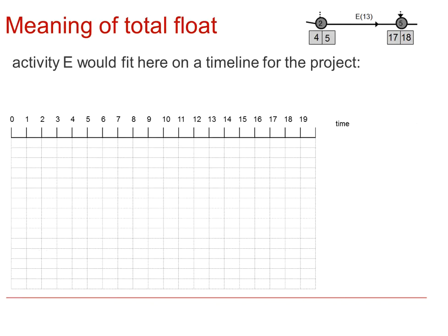So to set up the Cascade chart, we would establish a timeline where the time is in whatever units is given in the context of a question. So here we've set up the units from 1 to 20, with 20 being the completion time given in that particular example.